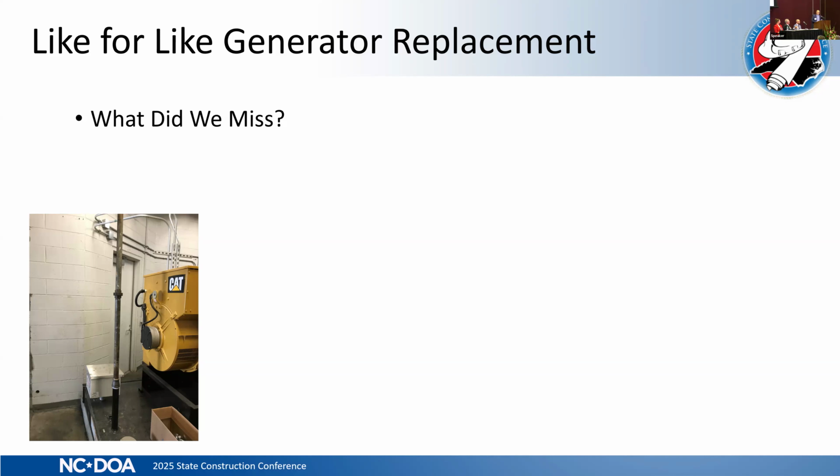They did make some recommendations. For instance, they said, don't go back with a remote radiator. With the radiator attached, you'll have to duct that radiator airflow to the exhaust. Fairly minor changes. We had a lead time of about 26 to 28 weeks, but we got the equipment ordered and we waited.